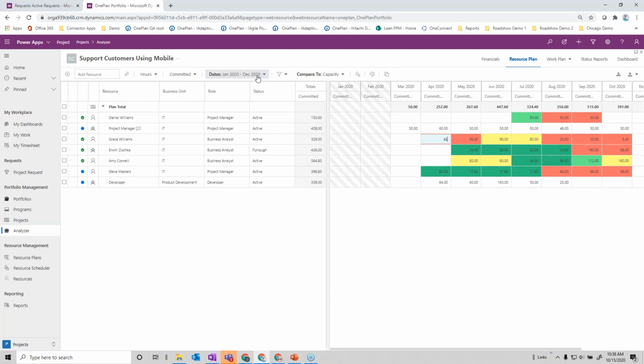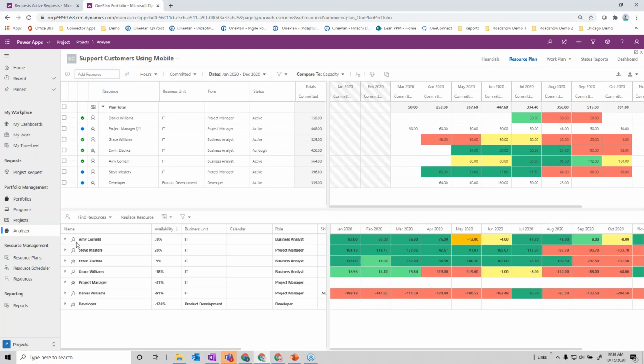Once again, you can get down to weekly on these resource capacity plans and look at whatever horizon you want, and see whether or not people are over and under allocated based on this plan that we have, either in the context of this project or looking at alternative resources that we might want to find to staff this project as we go on through.